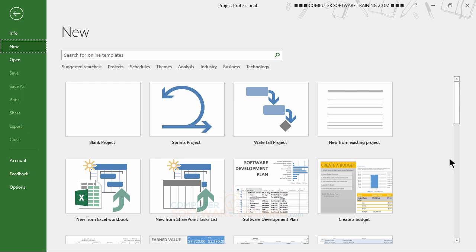And it wouldn't be any big problem until we get to a point where there might be tasks happening around the same time as other tasks in the other project that you've assigned the same people or resources to. On the surface, you're not going to know while you're in project 2 if a particular resource that you want to apply to one of your tasks is already spoken for in project 1 in a task that might be overlapping that same time period.